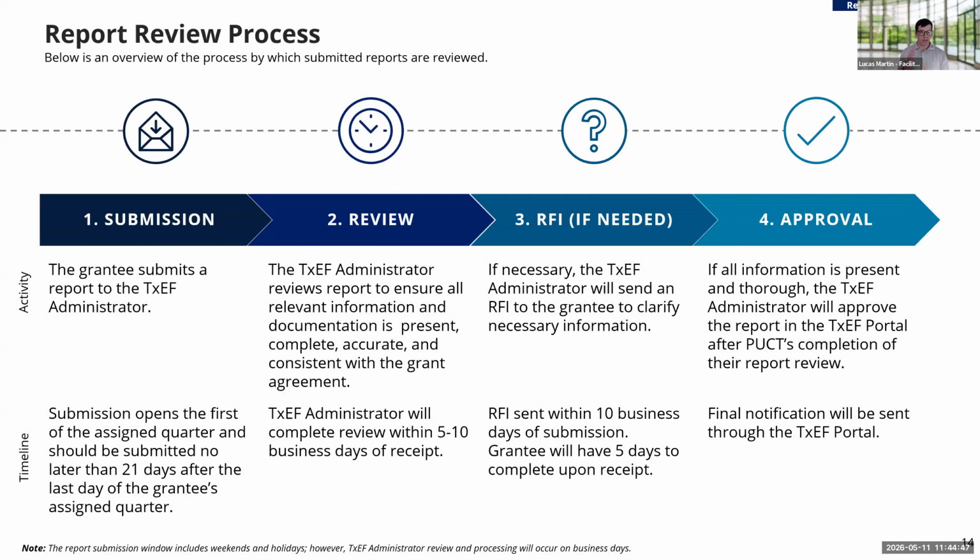And then following the process that we've been utilizing to date, and specifically more on the application side, you'll have 5 days to remediate any of those issues or provide any of the supporting documentation regarding the RFI that was sent. And if there's no other information or no other issues noted, there will be an approval noted through the Texas Energy Fund portal coming from the PUCT post their review of those reports. And that's for the financial report and the performance report, as well as those other reports as well.